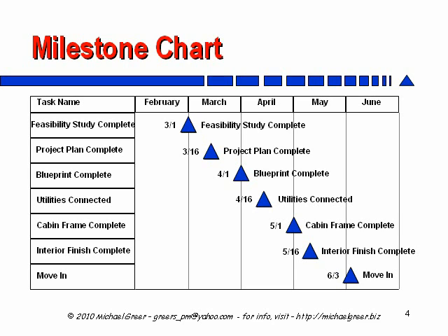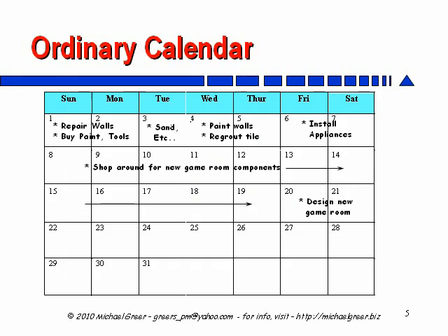Now, the milestone chart is sort of like an executive summary of your project. It shows major project events without all the individual tasks and phases being broken out. Typically, senior management wants to see a milestone chart. It's a nice little project summary. Now, an ordinary calendar is easy for everyone to relate to, and it has the added benefit of showing the days of the week, the months of the year, and so forth, so that people can integrate their own family events, community events, and other things that are important to them. This makes it much more likely that they'll have that calendar hanging in a prominent place in their workspace.